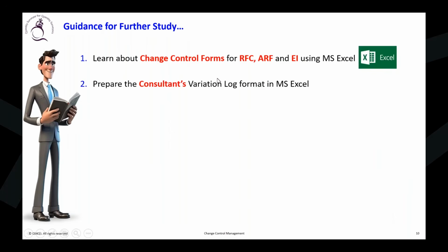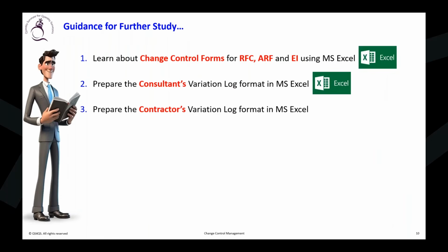Second, I can give you the task. If you work for a consultant, prepare the change control form or logs. You can say how you are going to manage the ongoing variation. That's a format you have to build. Third, if you are working for the contractor organization, you also have to prepare the variation log for the contractor organization, which is something different from the consultant one.